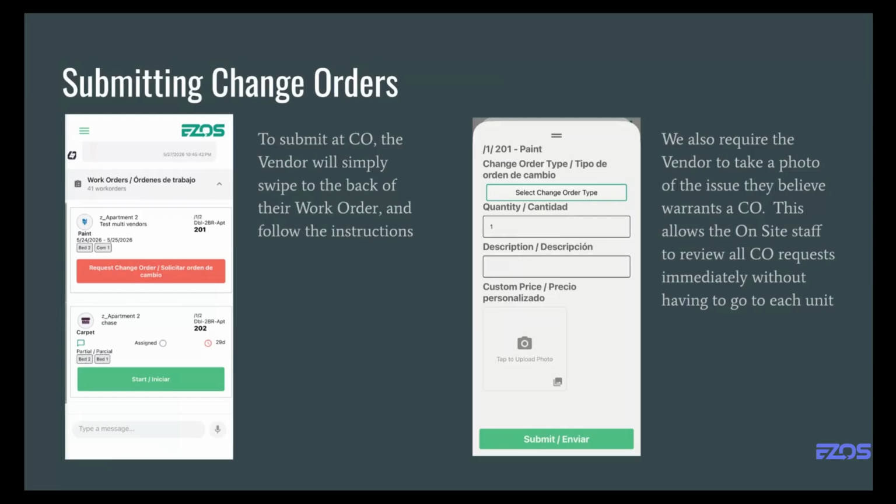This entire process of creation of a change order, completion of it, we document all that. We know who approved the change orders. We know obviously what vendor submitted them, but we have this now as a paper trail to show how we got there. We all have come across cases where maybe a vendor will bid really low to win, right? And then they get in there and they kind of sneak attack you with change orders. Not all of them, but it does happen, right?